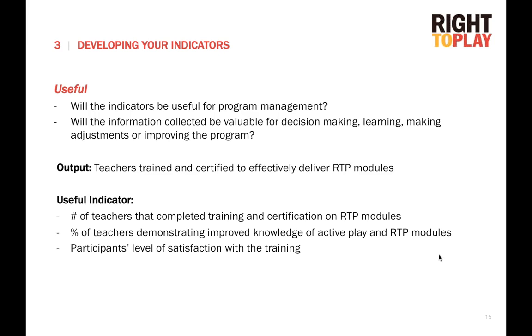So in that case, sometimes in our outcomes, the indicators are not exactly the same. They're measuring the outcomes, but they're described a little bit differently and more concretely. When we're talking about our outputs, as you're pointing out, the outputs are already very concrete. When we say 65 teachers trained, the indicator is the number of teachers trained. That's why I'm saying the indicators for outputs are usually quite easy. Usually, not always.